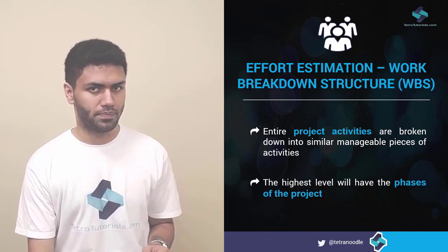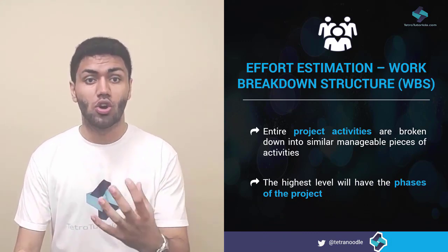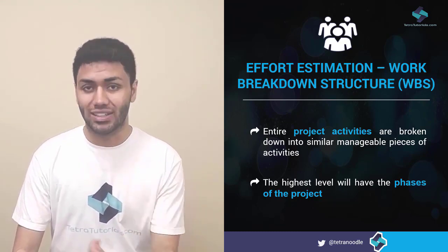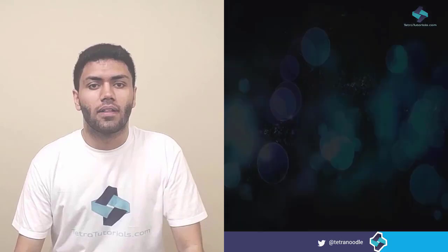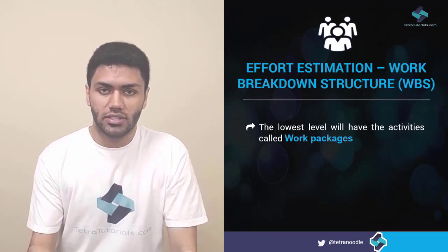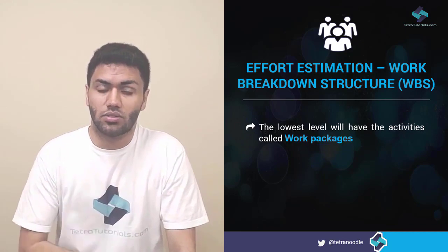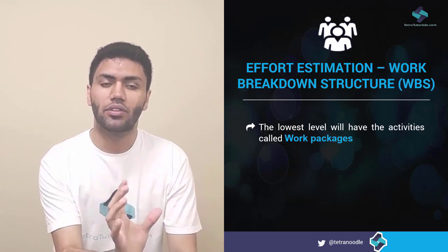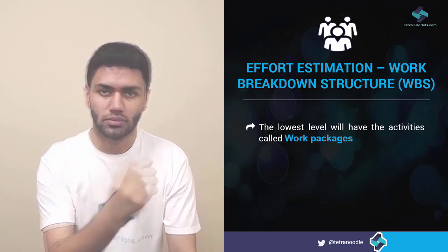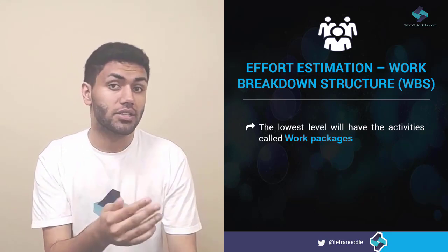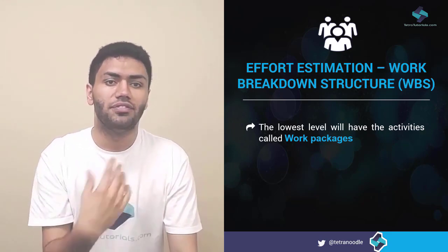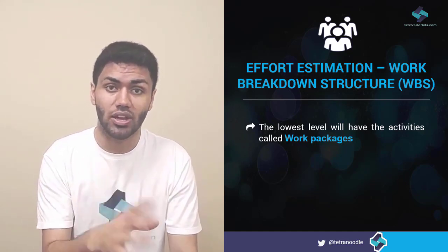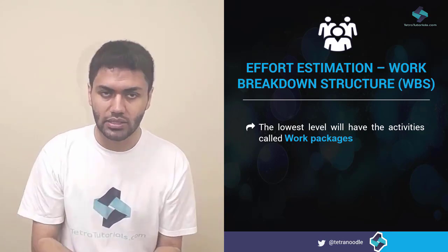When we break down the work, the highest level of the structure, or the sum of all the lower level children tasks and activities, will give you the estimate for that phase of the project. The lowest level of these estimates is nothing but the estimate of the tasks or work packages. A work package is a set of tasks that are combined together to form a manageable component. For example, if executing a test case is a task, then configuring the setup, identifying the test results can be combined together to form a work package to complete a test case task.